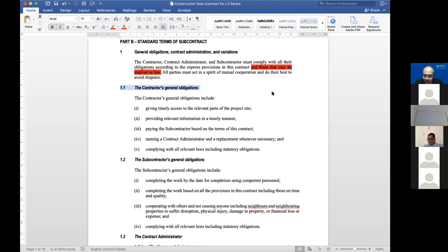I completely agree with Keith, who is saying that if you only rely on express provisions, then no matter how long the list, you're bound to omit a vital provision. Why take the risk? That's right. So don't go and start specifying the implied terms. The express terms are express terms, whatever is stated here, and the implied terms are whatever would be implied in law. It could be implied by case law, by statute, or potentially even through customs and trade, for instance.